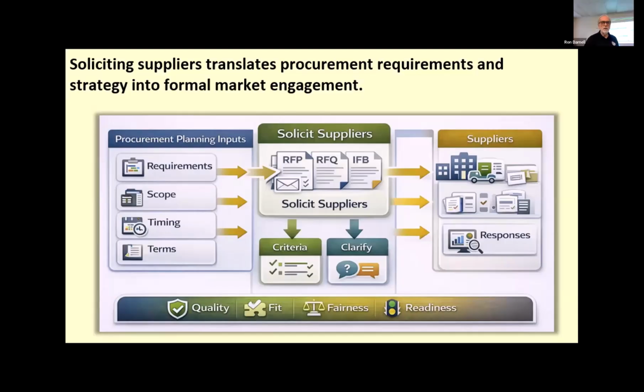The way I like to look at this is that on the project, you're always the buyer. You're buying scope from somebody. So you have some work you need to do that's part of your scope, say a work package in the work breakdown structure. You need to procure that work package. So you're going to go out on the marketplace and buy that scope from somebody.